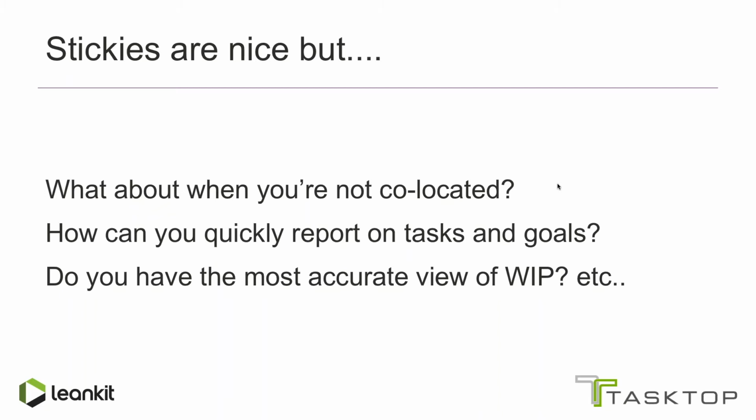And the other thing that might be hard to track is, what about all the other work? So there's not much work on this wall that is not contributing to department goals. But as you all know, in reality, teams work on a lot of different things. They prepare stuff. They come up with new ideas that they want to think about. They want to brainstorm on a bit. So capacity might be leaking away without you actually seeing it on a portfolio wall, which is fine, but you might want to track it anyway.